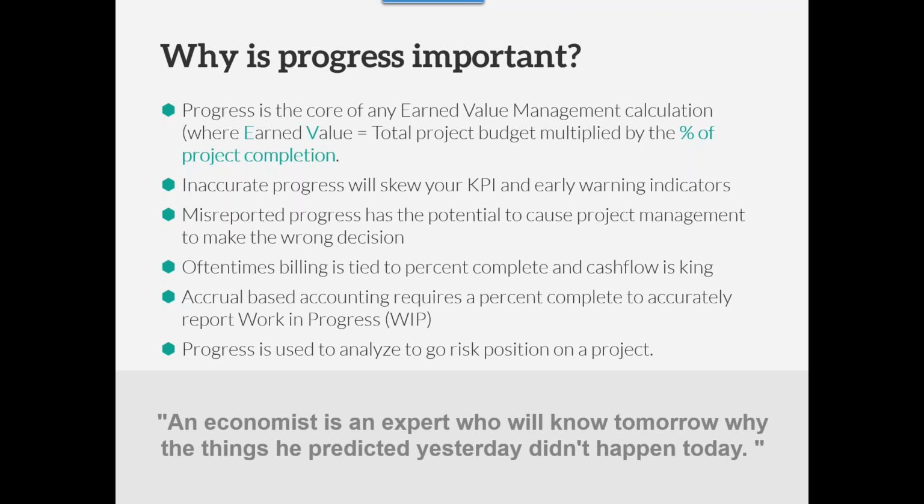And then there's the other part of it, especially for the folks sitting on the EPC side: there is an element of working with your accounting folks. At least here in the United States, I'm not sure where everyone is based, but for GAAP requirements for construction-based companies, you need to be able to report a WIP, or work in progress, and that comes back to understanding what your percent complete is and being able to work with the controller and accurately report where your project is.